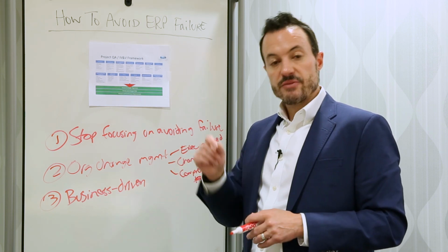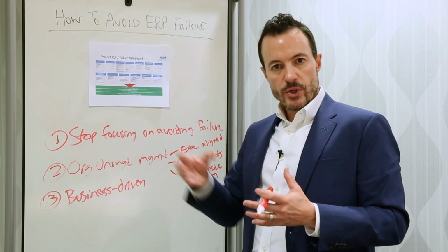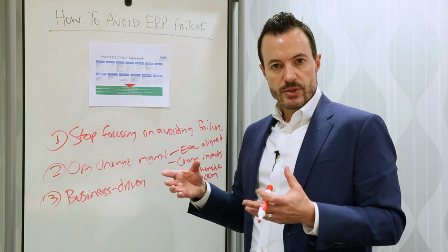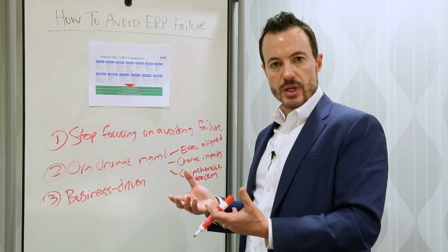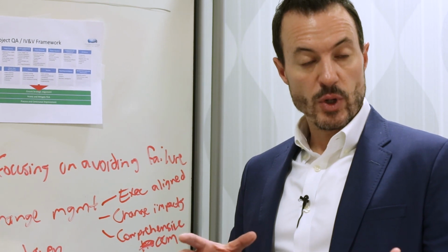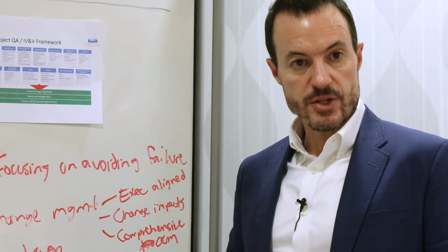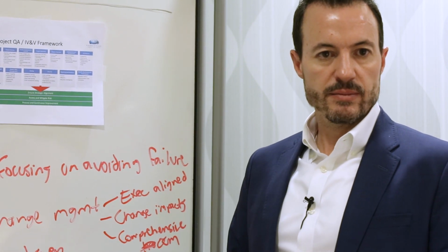And not only that, it'll save even more money because now we can dictate the tempo of when we bring in outside consultants and system integrators, so that we don't have a big army of consultants charging by the hour while we're trying to figure out what we want to be when we grow up. We've already defined that work and done that work up front prior to starting the technical implementation. So the business-driven aspect is critical to avoiding ERP failure.